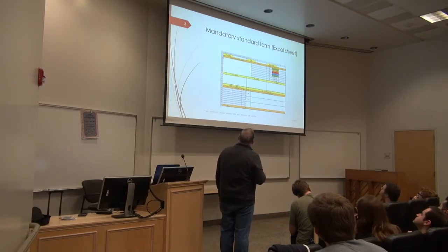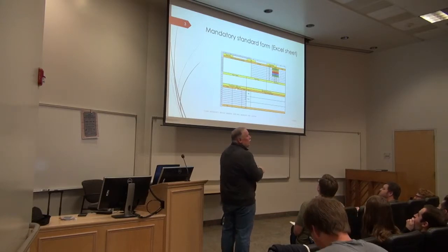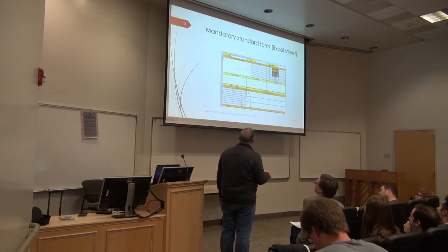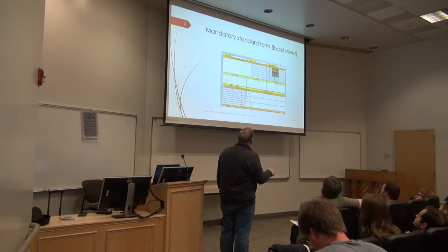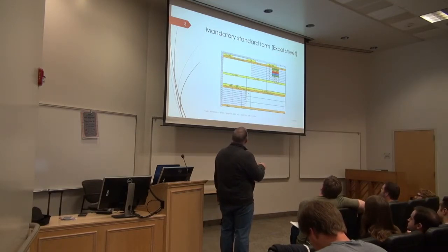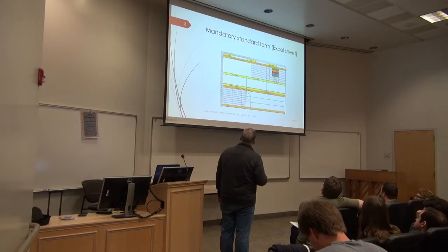This is your summary of the task: here's your project name, the date, who the project manager is, what tasks you have completed in the past week, what tasks you thought you were going to complete or for whatever reason had been delayed, and what's your work for the coming week. In other words, this should show the work that was done in the past week, this should show the work that you intend to do in the coming week.